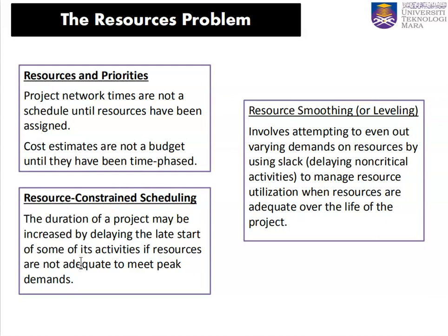The other one is resource smoothing, whereby we have flexible resources but time is not flexible. For resource smoothing, we might adopt a technique using demands and using slack, so we might delay some of the non-critical activities.